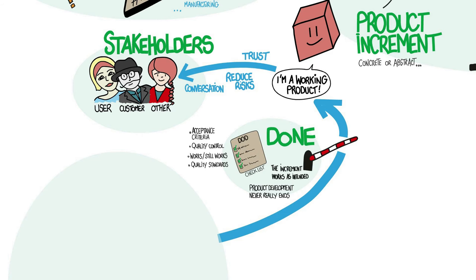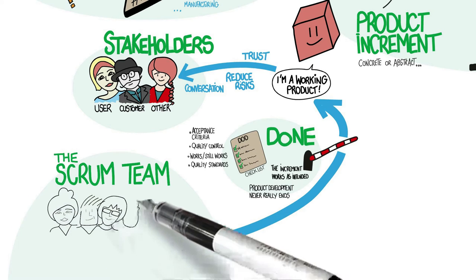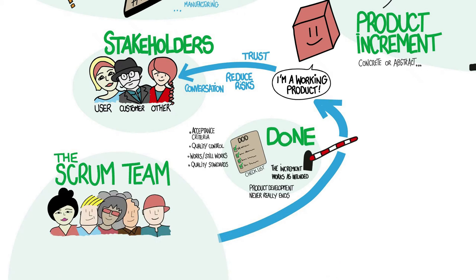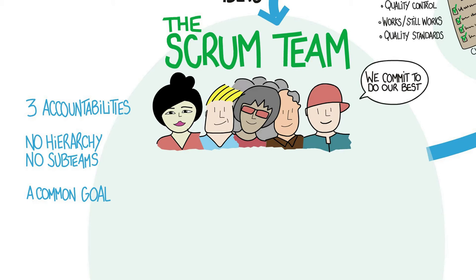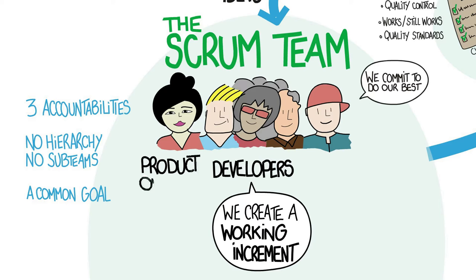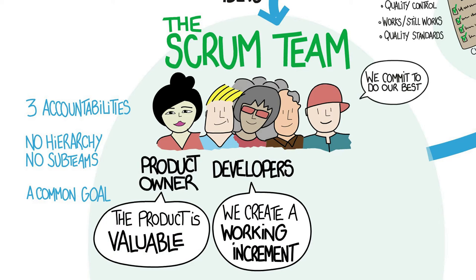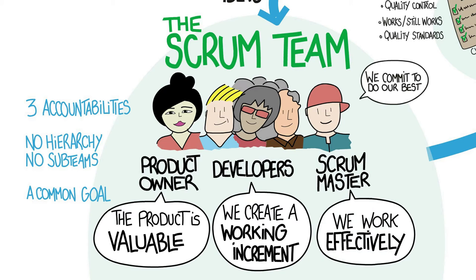The Scrum Team is accountable for creating a valuable working product increment every sprint. Ideas come into the team, the product owner sequences them, and the Scrum Team commits to do its best to turn the most valuable of those ideas into a working solution by the end of the sprint. Accountabilities define each member's contribution to the overall result. Scrum forbids hierarchies or sub-teams within the Scrum Team — there is one team working towards a common goal. The Scrum Team consists of developers, who are accountable for creating the increment; a product owner, who is accountable that the increment is valuable; and a Scrum Master, who is accountable that people can work and collaborate effectively.